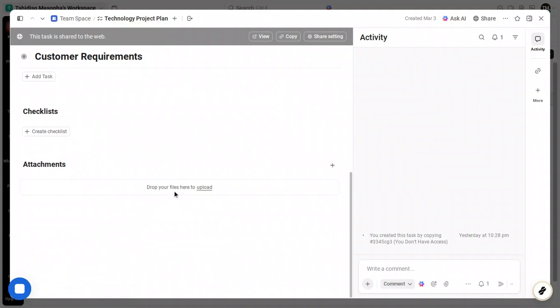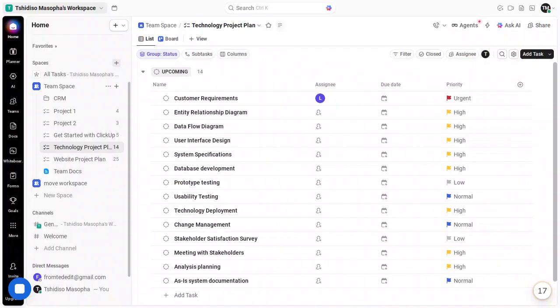While you're in the task, add a time estimate to clarify effort and support capacity planning. For example, you might set it to 2 hours. Combine that with a due date, a priority level, and any relevant custom fields, like effort, channel, or complexity, so reporting and workload views reflect the reality of the work. When you're done, close the task panel to return to your list.